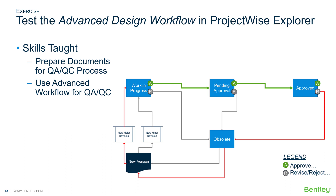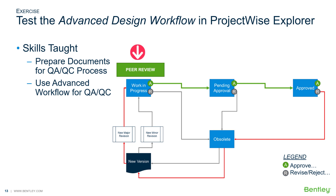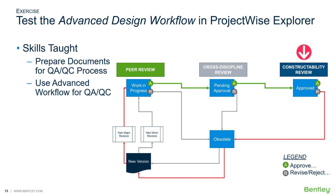Recall the conceptual workflow process diagram. There are three checkpoints in the QA/QC process: work in progress, pending approval, and approved. The project team has agreed that the peer review will occur during the work in progress state, a cross-discipline review will occur during the pending approval state, and a final constructability review will be done once the design is approved.